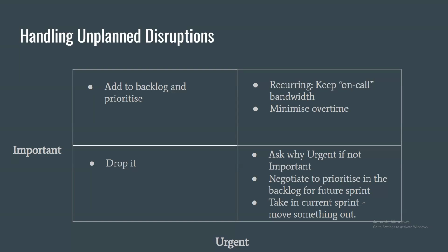Right. So there's a question from Shivansh. One question from estimation is story point: does it include QA story points too? Yes, absolutely, because that's what the team is working on, right? And one common mistake that I have seen is people will have one Scrum team which is developers, and one Scrum team which is QA. Never do that. Have your developers and QA work in the same sprint, and their total points is the story point.